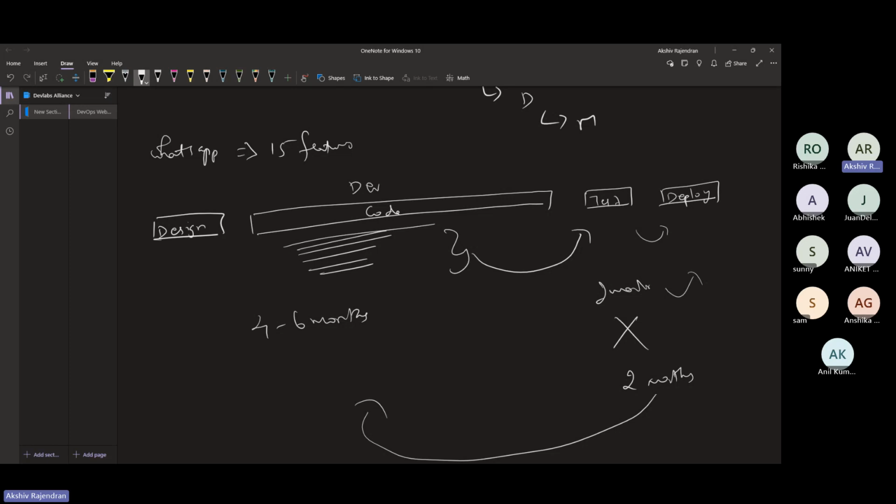Obviously, as a client, you need to satisfy me. And that's why I'm paying for my application. Now, if I'm going to give some suggestions or some changes, again from here, it will move back to the coding team because they need to rewrite the code. Now, see how this is going to delay my project. So this is a problem when it comes to waterfall. And if you're feeling like, no, the client is also happy, okay, accepted, everyone is happy here. Like within 1 year, I completed the project also. Success, super.